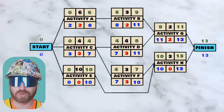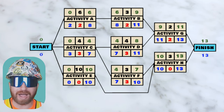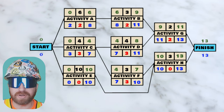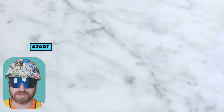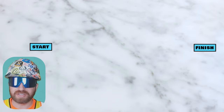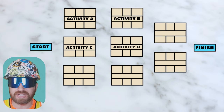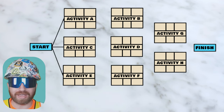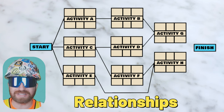Now we've made it to our CPM schedule example. This example is a manual calculation of what construction scheduling software will do for us, but we need to first understand how this works on paper so we can understand what's happening behind the scenes. Once you understand how to manually calculate a CPM schedule, you'll likely never need to manually write one out again because your software works ten times faster. This example has a starting milestone, a finish milestone, and eight activities in between labeled A through H. I'm connecting these activities together with lines, which is how we sequence this project, and each line represents a finish-to-start relationship.